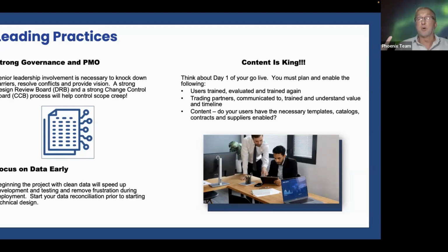It doesn't affect anybody else in the organization, but it's going to cost time and money on scope creep. That needs to go to the design review board to validate if it's a correct design. And then it needs to go to the CCB to make sure that we either catalog appropriately or put it in a backlog or reject it wholly. Now, I may have 10 people with the same issue. That may change the calculus on the approval process, but it still needs to go through the approval process to make sure we're not violating the rules of the contract and scope creep.